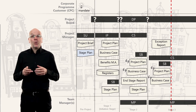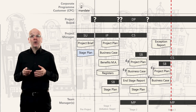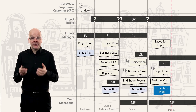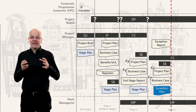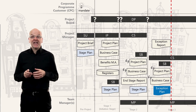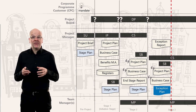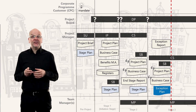The project manager then works on a new stage plan to deal with this exception, which is why it's called the exception plan — we only need to create it when dealing with an exception. The exception plan is focused on completing the current stage and fixing the issue, continuing from where we left off. The team manager can help the project manager with this exception plan.